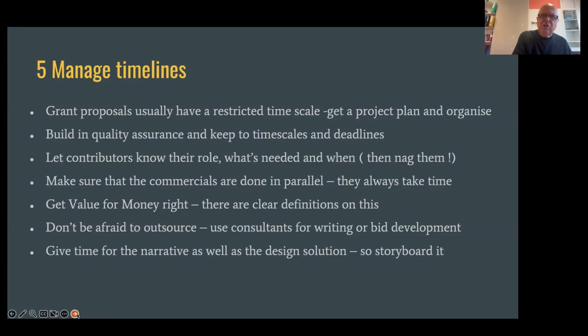If you let people know what their role is in terms of the bid or the grant application, then it's easy to manage their time. Because if you're not careful, what happens is everybody thinks deadlines are flexible. If you know and you let contributors know their role, you can nag them. Do the commercials in parallel. They always take longer than you think.